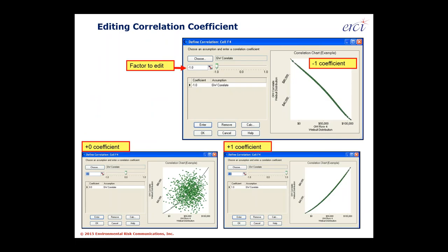Another area we've become proficient at is Monte Carlo modeling. One critical aspect is looking at correlation coefficients that go into individual cost factors. Monte Carlo modeling can break down fast if this correlation work isn't done right. By default, all Monte Carlo tools let extremes of uncertainties cancel each other out. If you factor in 10, 20, 30, or 40 different variables, those uncertainties will cancel each other out and provide a false degree of certainty around the liability forecast.